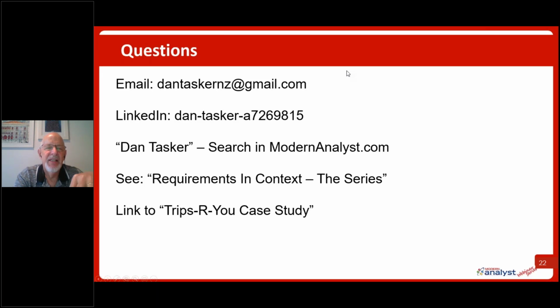Once you have your high level requirements and you have those capabilities in scope, now you need really an IT person, someone in the delivery team, that says, hey, you produce reports. If it's a simple report, how long does it take you? What do you estimate? If it's a medium report, what do you estimate? So as part of the project, the project manager needs to get someone who is able to estimate the delivery time. And they do that using those rough estimates.